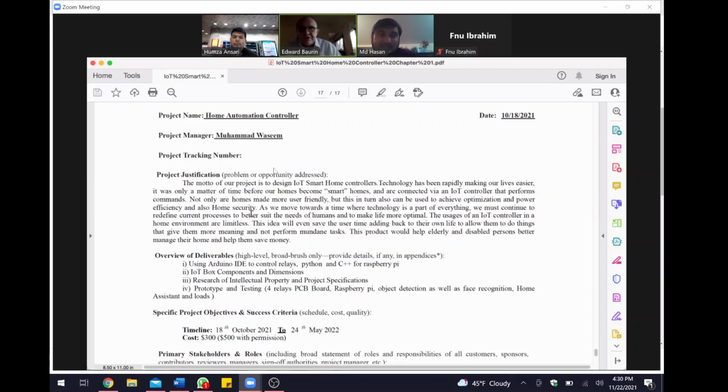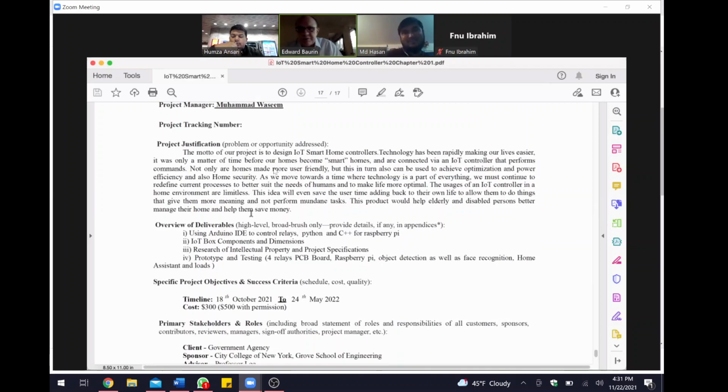So when they want to see project justification, what they need to read? They need to read the introduction, they need to read the need, and they need to read the problem to be solved, right? These 3 things are project justification. But here in the project charter, just a straight line. We are justifying, you know, we want to do this project because it's hot on the market and we want to address this issue. That's it. Okay. Without any explanation, because if people want, they have plenty of space to read.